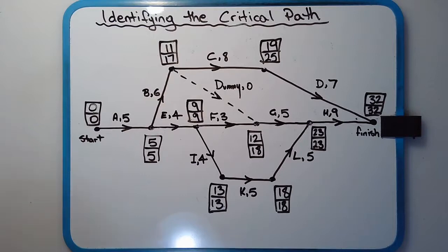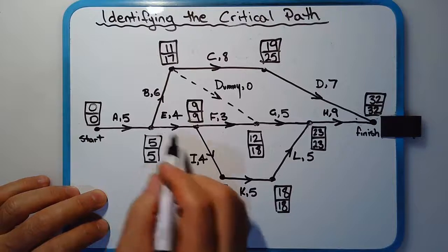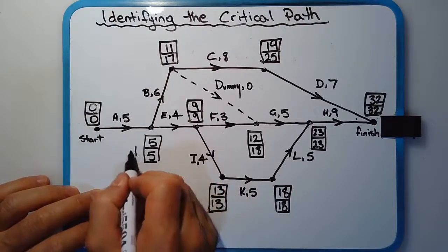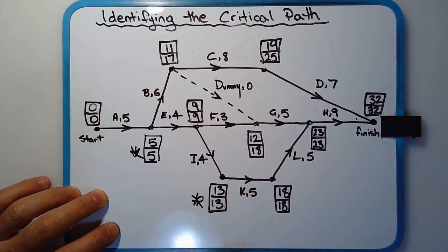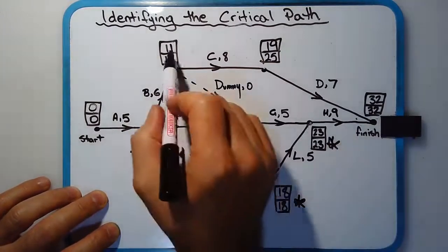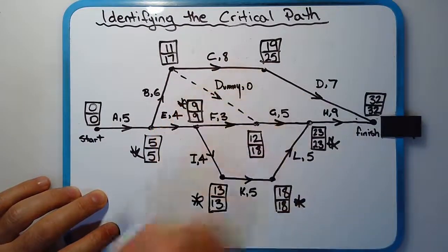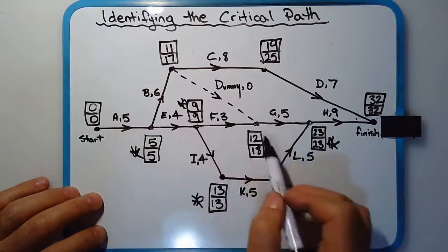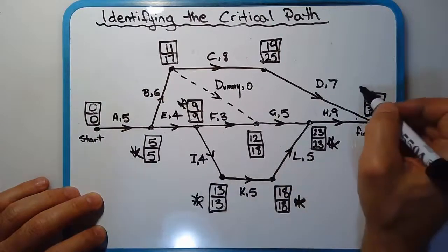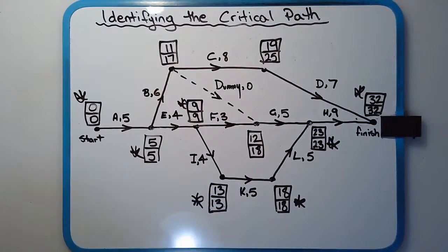Now let's see if we can identify which activities have the same EST and LST. So clearly, just look for the dominoes that have basically identical boxes top and bottom. So that's one there. That's one. That's one. That's one there. So clearly these two are not. There's one here as well. So that's not, and obviously the start and finish are always part of the critical path, of course.